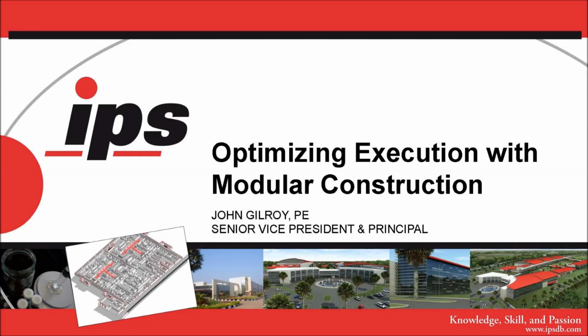Modular construction should be considered and analyzed during the design phase. That's the best time to start looking at what could be targeted as a system or a configuration, and what are the constraints around that from your layout as well as system capacity. Defining the future system capacity and expansion capabilities up front, performing some 3D modeling to convey the intent of what you want the modular construction to consist of. Talk about shop and field interface coordination, so it's clearly defined. Normally we see matrices developed to portray what's required and what's expected.